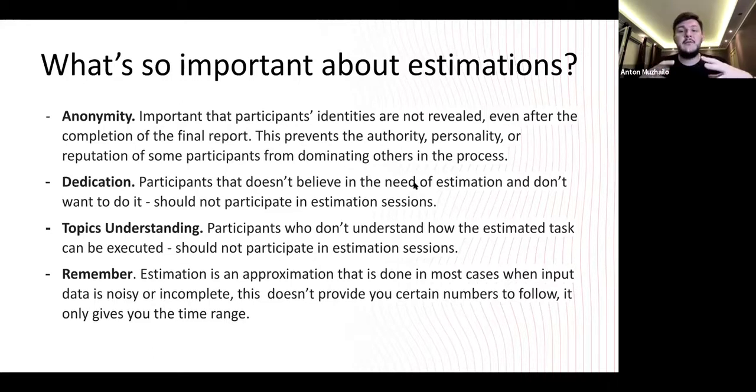You provide the average estimate. Of course, if this average task will be performed by junior, it will take longer, but the second average task will be completed by senior. It will be faster. So senior will finish faster and take another one, or help junior to complete his or her one. So this is the same deviation. We're talking about the average estimate. And this average estimate in one case can deviate to minus, but in the second one to plus, and you will have a balance in the end.